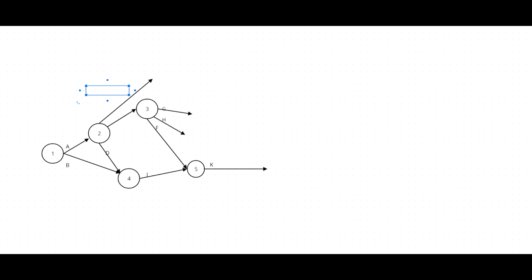Here the C, here we can say E. Then E, K, we can complete using another same event, but G, H start in the same event. You can't complete both using the same event. In a situation like that, skip for a moment and give the part for the next.